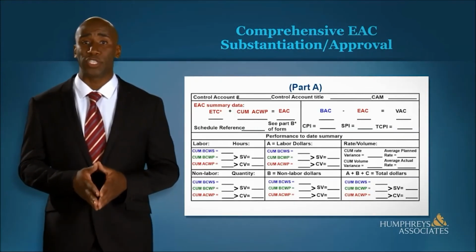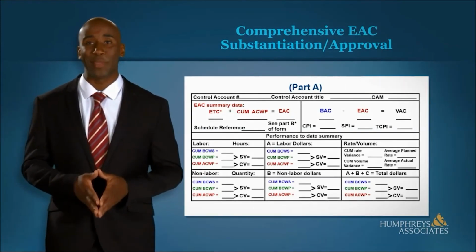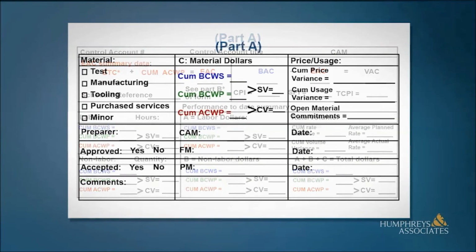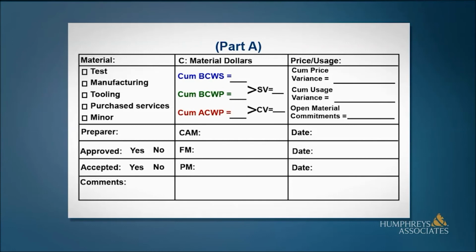This is an example of a worksheet that could be used for EAC documentation. It has information about what is yet to be accomplished as well as the BAC, EAC, and VAC. There are calculations for EACs that can help to determine the realism of the EAC. These will be discussed in the next part, indices. Those who use worksheets to document their EACs consistently derive more accurate EACs.